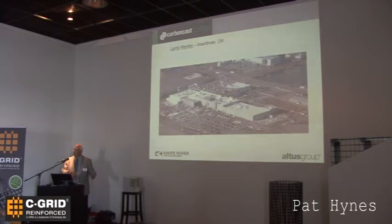It's all the mechanical equipment, electrical equipment that goes inside. Oh, you want to put a hole in this wall? Yeah, we can do that. Well, they don't tell you that. We actually had beams that we had to shallow up 12 inches. We had to widen them, and all kinds of things. The last day we erected, they're still cutting holes there on the site for plumbing and everything else. So it was quite a process.